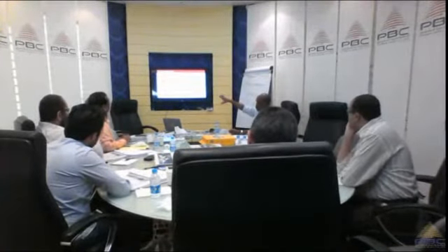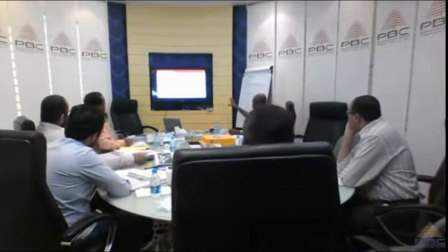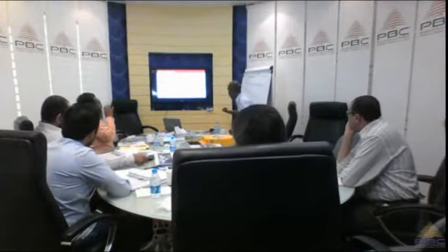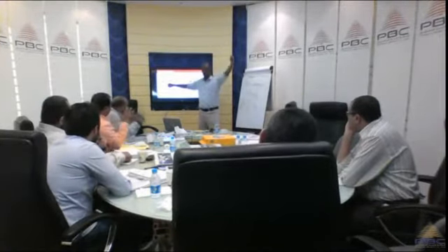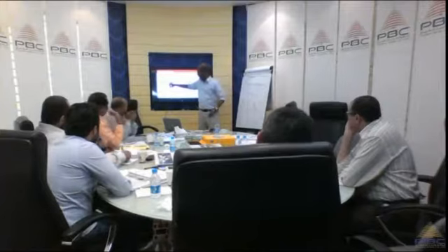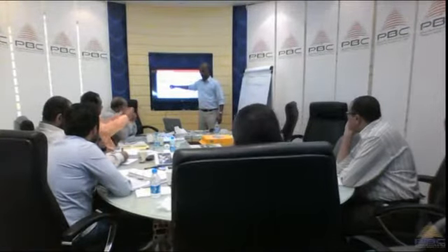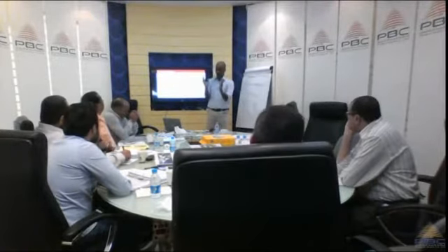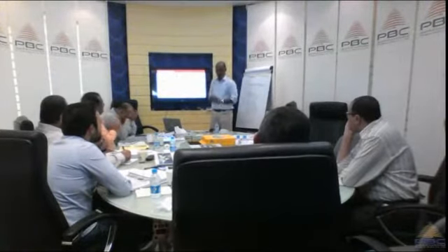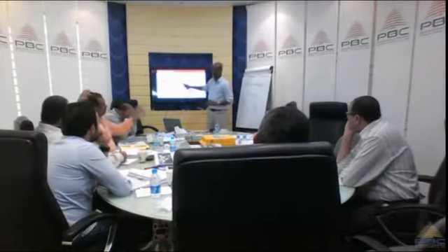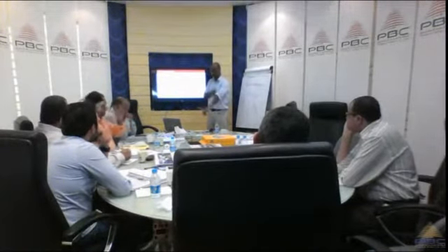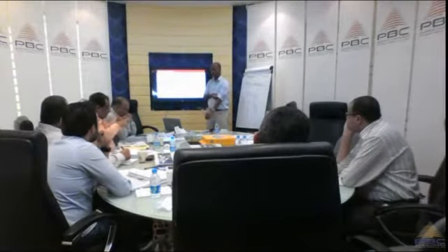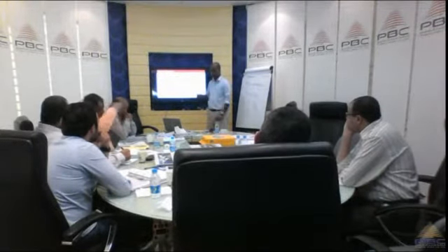Okay, so the control process itself consists of what? What are we doing here? We have our project schedule, which is our baseline. And the data collection from the execution side. Exactly. So work performance data is the actual. We compare the two. We calculated the schedule from our past assumptions and from experience, and we prepare it with discussions, etc.